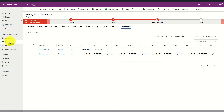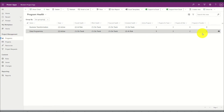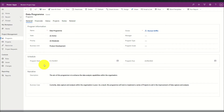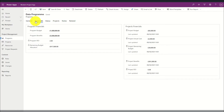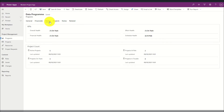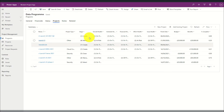As well as project management, the system can also be tailored towards program management. We will demonstrate this by navigating to the programs area and selecting a program. Once opened, we can define a summary of information about the program such as start date, finish date, and priority. By navigating to the financials pane we can see a summary of project financial data rolled up from related projects, as well as program financials including overall program budget and return on investment. The program status shows a summary of active projects and those on track, at risk, and in trouble, as well as custom KPIs. The projects tab shows a list of current in-flight projects related to this program.